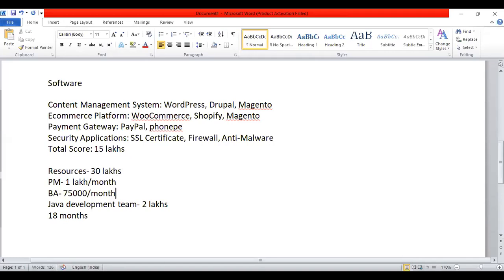Total resources. So guys, what I'm trying to do here is, this is how the feasibility study is calculated at the beginning of the project. And whenever a change request comes, what happens? Again, we need to say, okay, the reserve 20 lakhs, is it enough to accept the change request? Or should I add more to the budget? Should we go and talk to the client and add more money to it? So this is how in real time feasibility study calculations happen, guys. Clear so far?